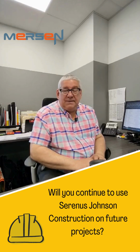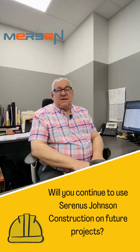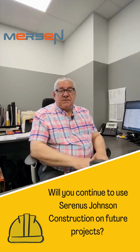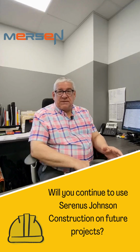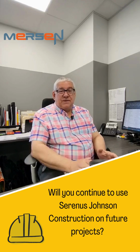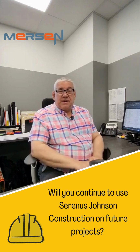We did a lot of paint, epoxy on the floors. One thing I would also say with Serenus is we did all this while we made 100% production. So they were able to work around our schedule, and it was always them working around us. They understood that production is what was able to pay the bills. So they always worked around that, kept us informed so we could keep our team informed of what was coming on, if they're going to close one of the roads on site, if they had to shut off power to an area, if they were going to block it off because of overhead work. And they always let us know ahead of time. And if we said it doesn't work for us then, when will work for you that we can do it? So they're just so accommodating.